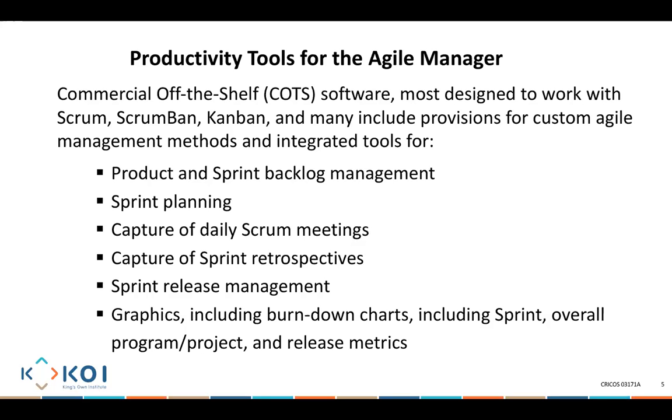So instead of repeating the same mistakes we made while trying to deliver the sprint, we sit down at the end of the sprint and say, okay, what worked very well while we were trying to deliver the sprint? And they tell you. And then you say, what didn't work very well while we were trying to deliver that sprint? And again, you get that information. From there, you'll be able to pick up that information from people and learn about the mistakes you were making, so you can learn not to repeat them. So it's very, very important to learn from the mistakes you've made so that you won't repeat them.